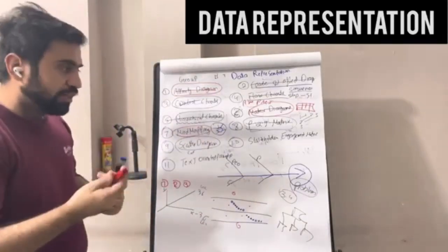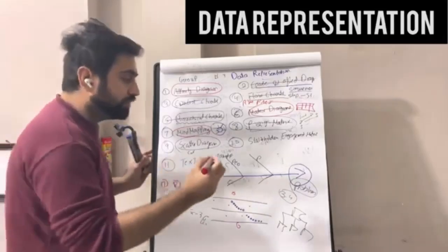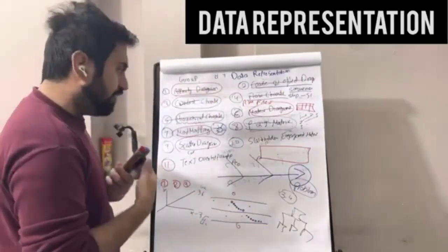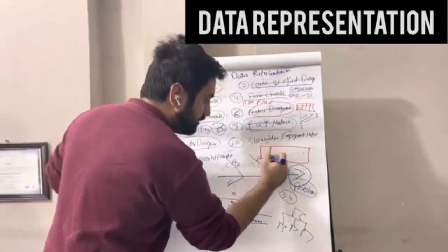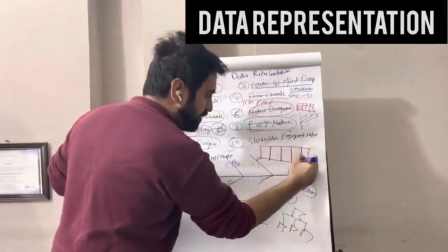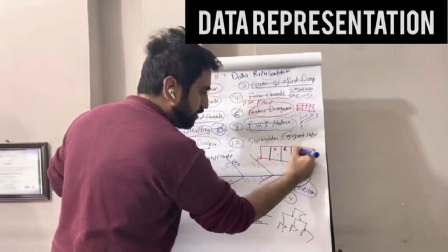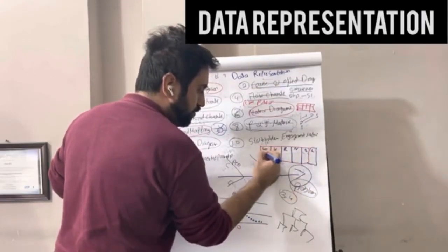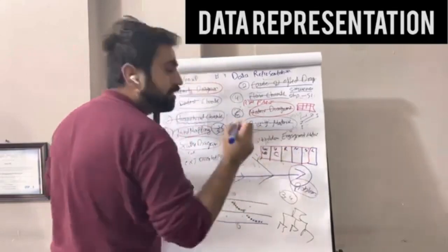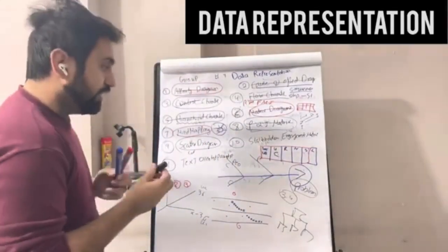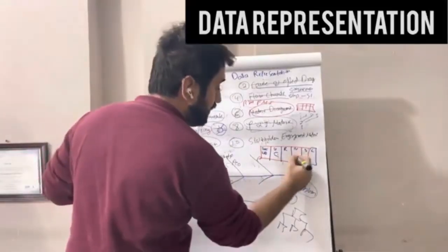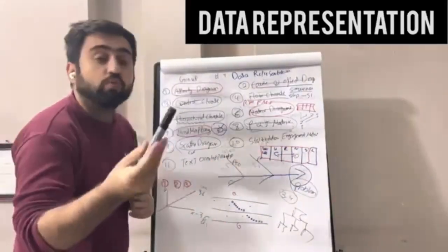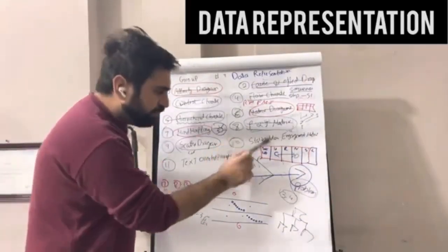Stakeholder engagement matrix. Of course, a specific tool used in stakeholder engagement in order to see the current engagement level of stakeholders. Okay, so if I put unaware, resistant, neutral, supporting, one more, leading. Stakeholder 1, 2. What is the current engagement level of the stakeholder? Okay, and what is the desired engagement level? What do you desire from current engagement to desired engagement? This is a very important matrix.